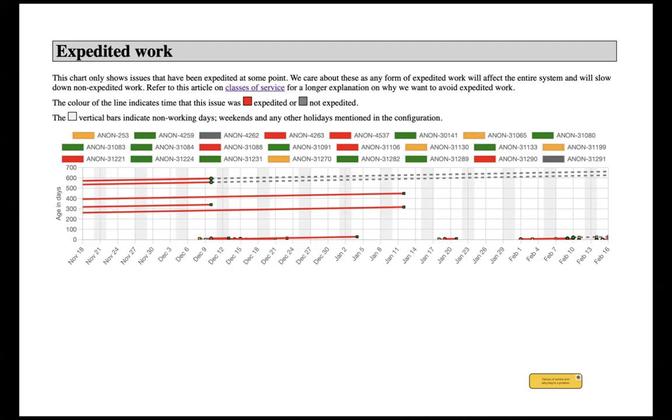But if we can reduce that number down, if we can say there's only 2 priorities, we've got regular work and we've got expedited work. Now it does become clearer and we can start to see, well, expedited work does get done faster. So we can color code that. So this is my general advice to teams: reduce the number of priorities that you have. If at all possible, take it down to 2. We've got standard and we've got super important, and that's it. Because as I say, when I graph all of the priorities together, I see no correlation.